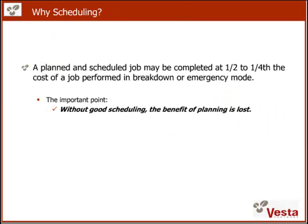This is the main reason why you want to perform scheduling. A planned and scheduled job may be completed at half or even a quarter of the cost of a job performed in breakdown or emergency work. What you want to do is get your maintenance organization to plan work rather than work in reactive mode. Without good scheduling, the benefit of planning is lost.